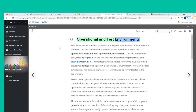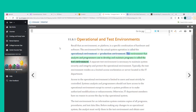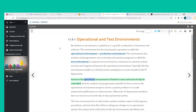An environment or platform is a specific combination of hardware and software. The environment for the actual system operation is called the operational or production environment. The environment that analysts and programmers use to develop and maintain programs is called the test environment. A separate test environment is necessary to maintain system security and integrity and protect the operational environment.